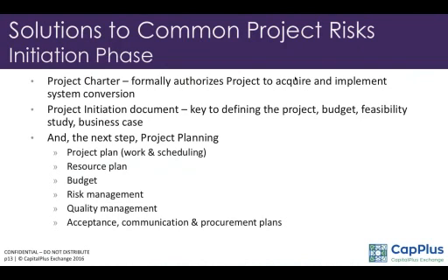The need to define approvals and acceptance authority and points were underlined in one of the financial institutions that we worked with, who made their business case internally and progressed to the point of systems development cycle with the selected vendor. The board was asked to approve the selection, but in fact rejected the request because there were two different understandings, and the project was set back by many, many months.